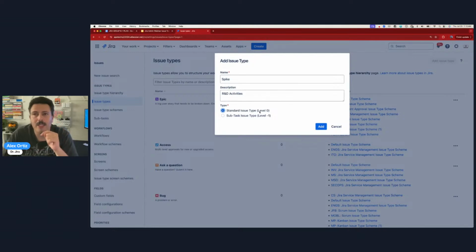If your requirement is that this issue we're trying to capture always has to be linked with something else, like the story or the bug, right? I like to do risk as a subtask because risks, in my opinion, should be tied to whatever caused the risk, so maybe the story or the issue type that caused it. And so when we're doing that, the subtask will make it so that it never shows up using the create button. You can never click the create button to create subtasks. You always have to go into a story and then create that subtask type.